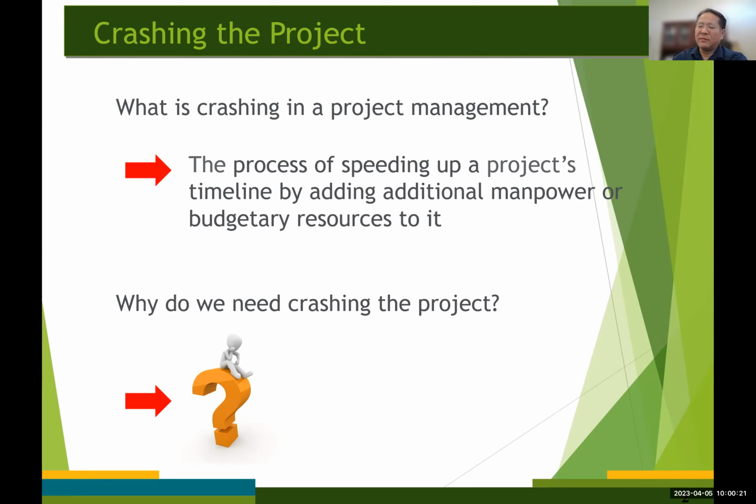And any other unforeseen circumstances could also pop up. So for example, during the middle of the project period, if there is a huge penalty for failing to meet a project completion deadline, then putting in some additional cost could be justified to an extent, right? So that's where project crashing comes in.